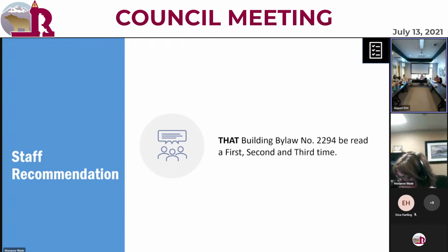So, Chair to Councilor Elliott, I think you have a valid point there. The concern is, well, money is crucial in a building game. Say the construction costs are $500,000. Our housing prices right now are $700,000. Our cost of land is 3, building is 4 or 5. Look at the type of houses that are being built. 10% of that is $50,000. Right, and that's a big chunk. If you're building your own home, putting $50,000 on top of your development cost charges is a significant hurdle to overcome. You've got your DCC charges plus your deposit on your building, and when you're trying to get your foundation in, that $50,000 you've got to give to the city is not your working capital anymore. So it's a tricky one.